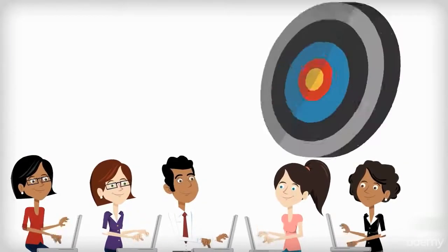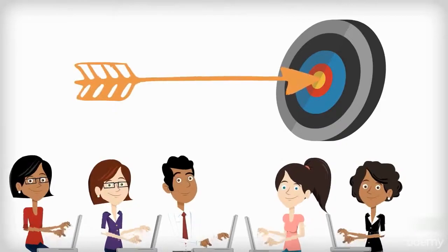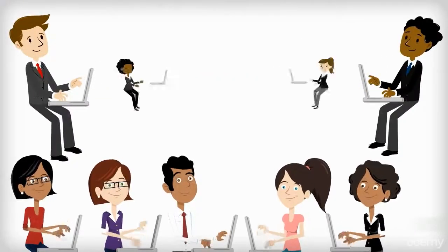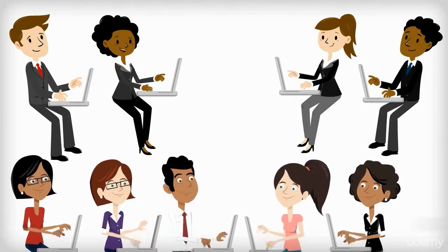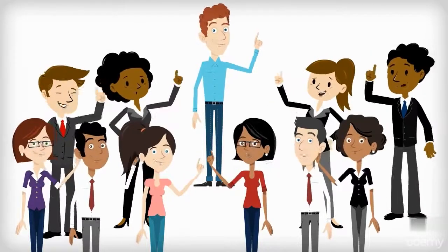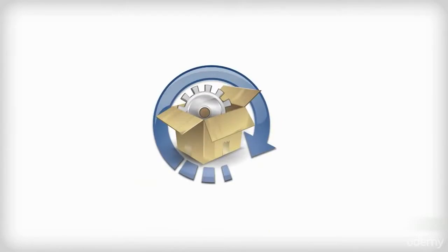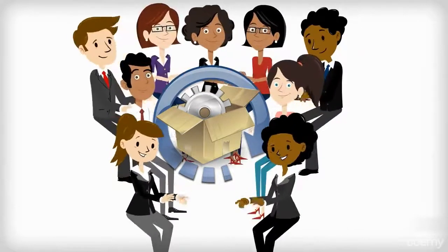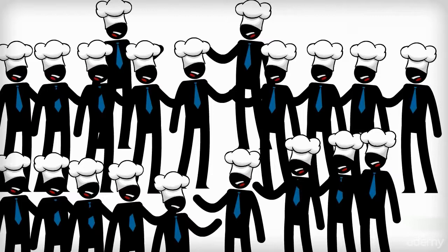Scrum teams should be lean, mean, productive machines. As mentioned previously, the ideal size of a team is 7 plus or minus 2, between 5 and 9. This cannot be emphasized enough. Having a team that is too large will make planning very difficult and cause frustration. Scrum meetings will end up either with too many people trying to communicate at the same time or with the need to remove people from meetings to keep them on track. For a software project, it also often means that too many people are attempting to work on the same code base. For the non-technical reader, imagine 20 cooks trying to cook a broth at the same time, and hopefully it will paint the picture for you.